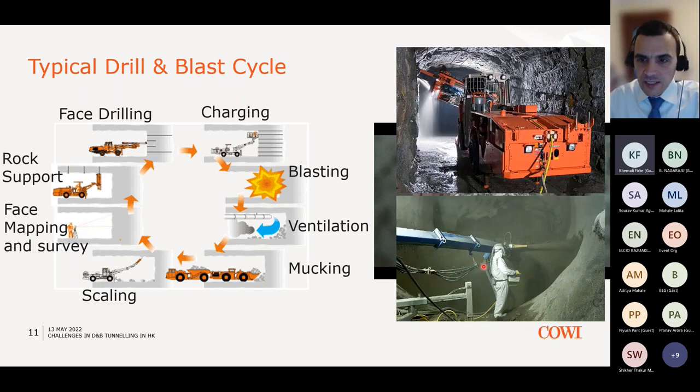And the last step of the cycle is to install the support, which typically for a drill and blast tunnel, consists of rock bolts and sprayed concrete. And that's the last part of the cycle. And then the next cycle, the next advance starts.